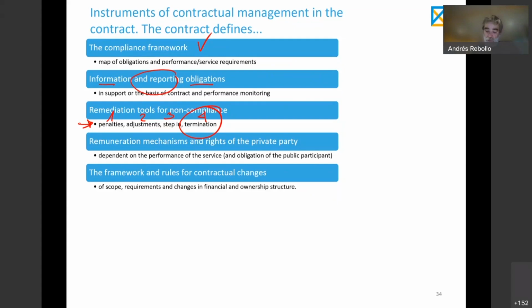So why not accommodate the contract already for a certain degree of change, so we don't need, under some boundaries, for example plus or minus 10% of kilometers per year that we could request additionally to the original plan, to contemplate already and cover the procedure to agree on the price for those additional services to be requested from time to time, putting a price from the outset on any additional kilometer with a limit of changing 10% of the original service plan.